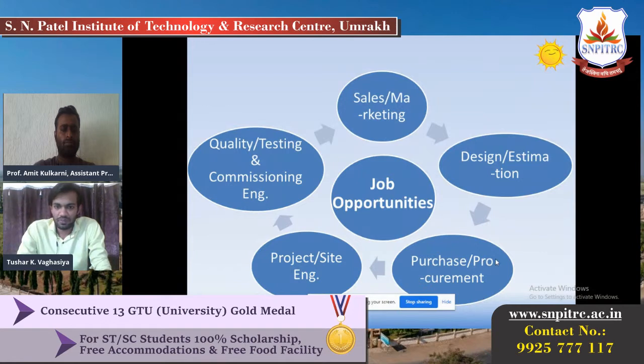So once the purchase is completed, the purchase person is also taking care of how much time it will take to deliver the items. If a module is coming to the site, how much time will it be, either 1 week or 2 weeks. So as per their discussion with the supplier, they will supply the particular equipment required for the site